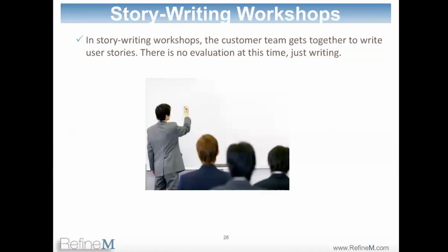So they come here, they start writing stories one by one. They may use the board, or they may use the index cards. They may go over each story one by one, add the conversation part of it, add the acceptance criteria to that. And if you do a half day or full day user story writing workshop, really you can write a significant amount of user stories that are important.